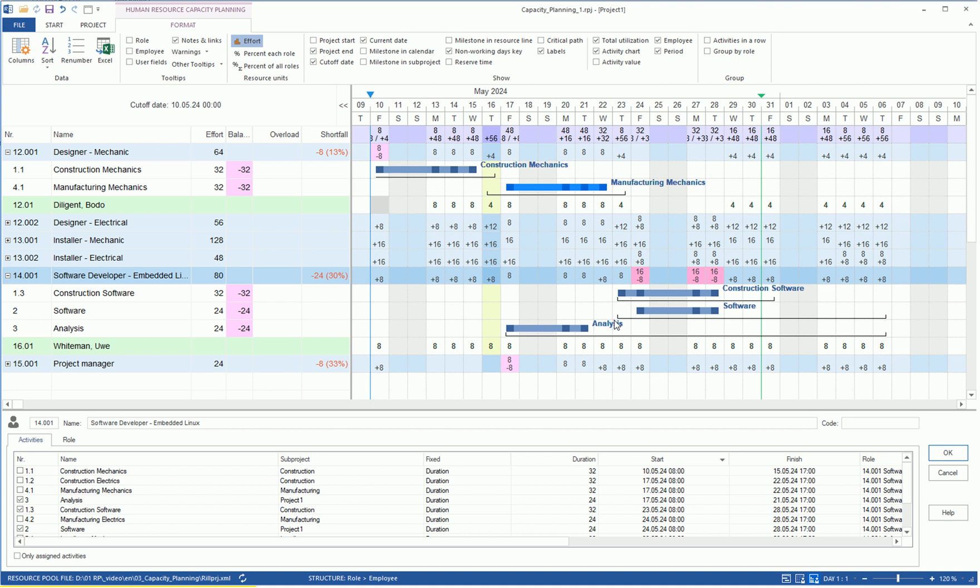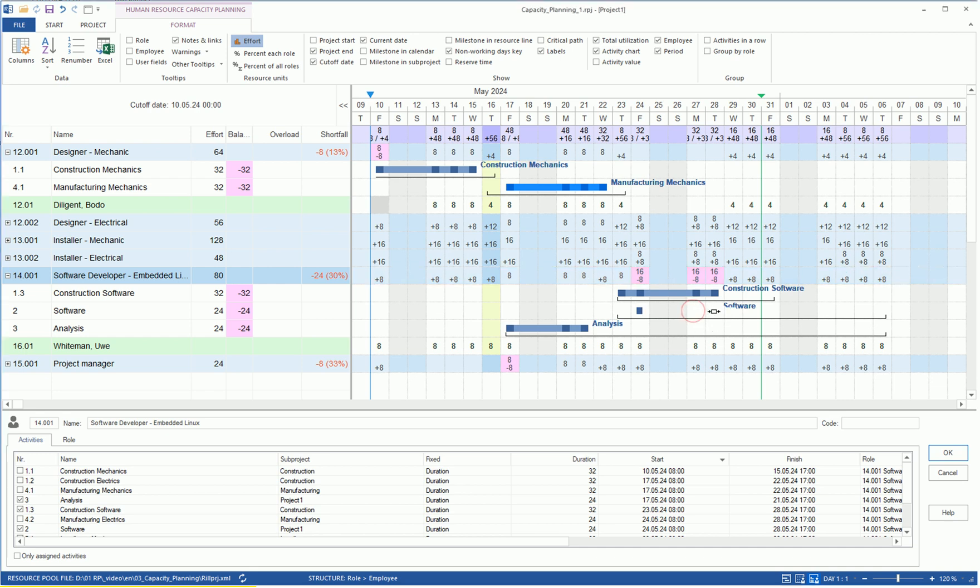The under-coverage of 24 person hours arises because two tasks overlap during the period from May 24th to May 28th. With the period option turned on, RealSoft Project marks a timeframe within which we can move a process. Thus, we plan to start the software task on May 29th.